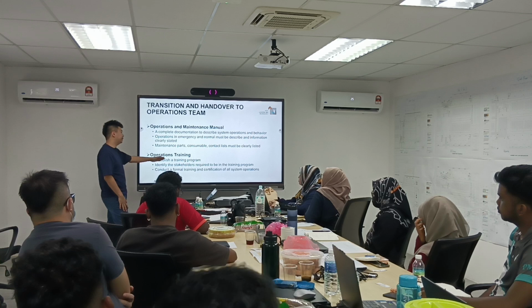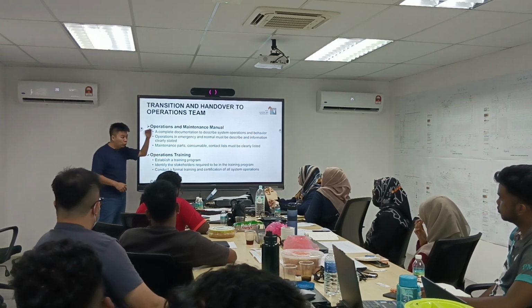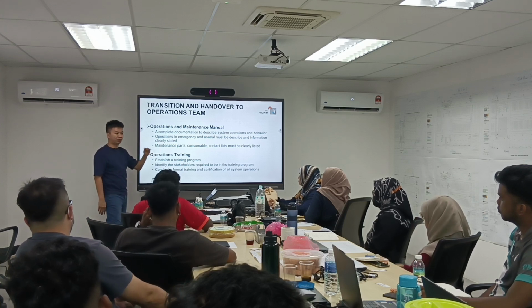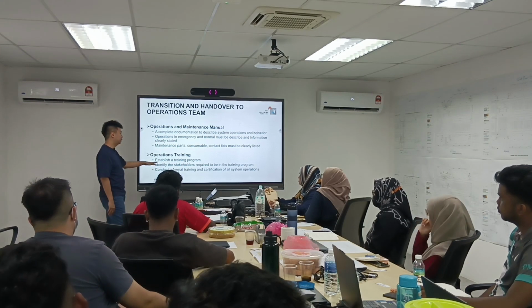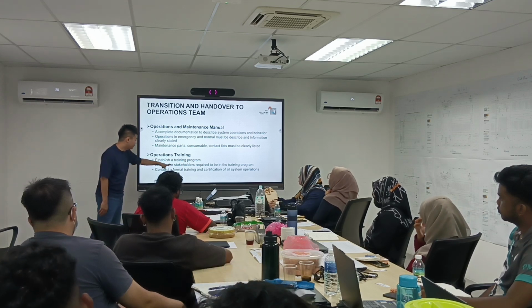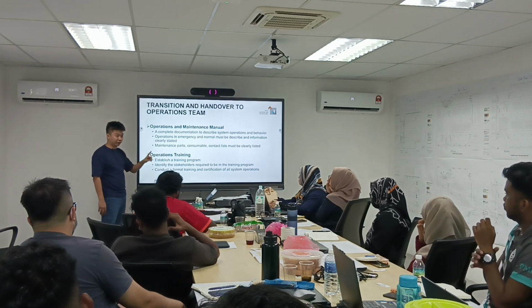So we should make this training program an established program. Who must be attending? If that guy is not here, I'm not going to run the training. And what is the training content? This we need to establish. Then identify the stakeholders, as I said already, and conduct a formal training and certification for all the systems.